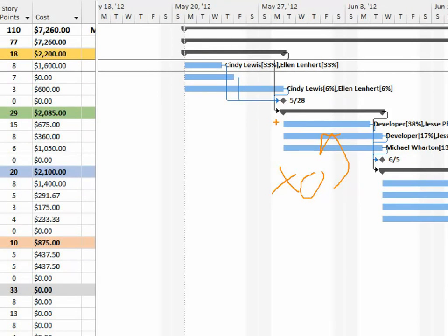summary task. Well, in a sprint process, we are time-boxed, and this is really an important concept: executives like to see things in a waterfall fashion. Phase 1, Phase 2, what are we getting done? Technical teams or development teams love the iterative process, but if we lose sight of the prize, we might have endless sprints. So by time boxing your summary task and tying them together, it allows you to ensure that we are not crashing that schedule.